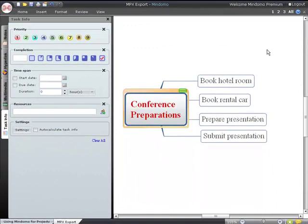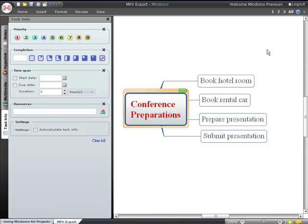Any topic in a map can be a task. A topic becomes a task by having any task information attached to it. This can be a priority, a completion, a start or end date, a duration, or a resource that says who's doing it. To add this information to a topic, you simply select the topic, then click the required setting in the task info window.